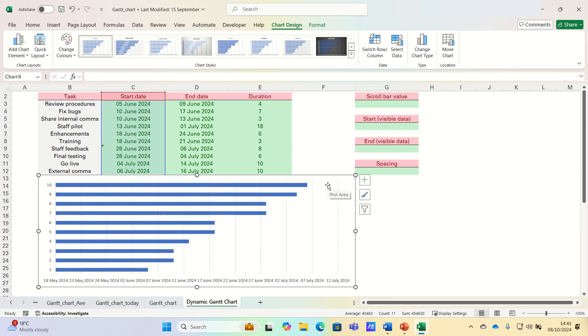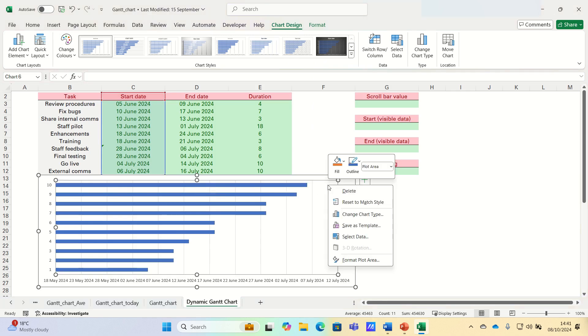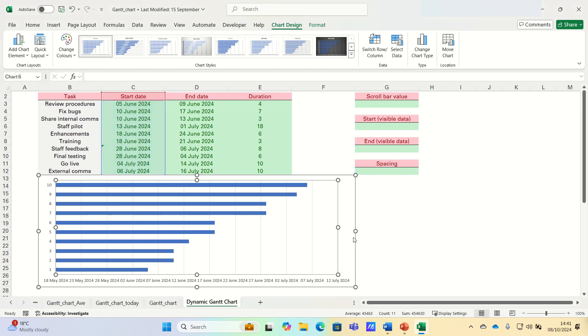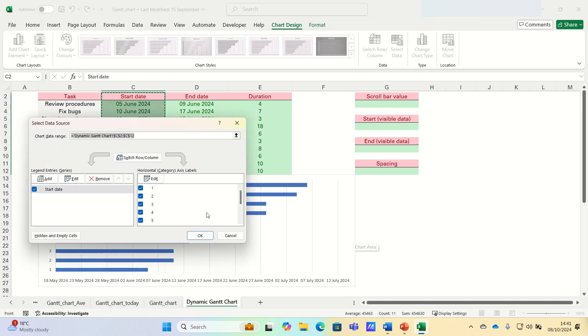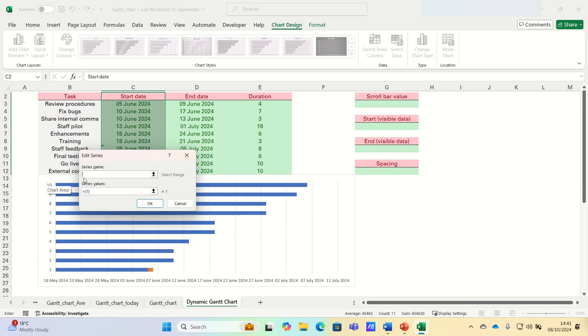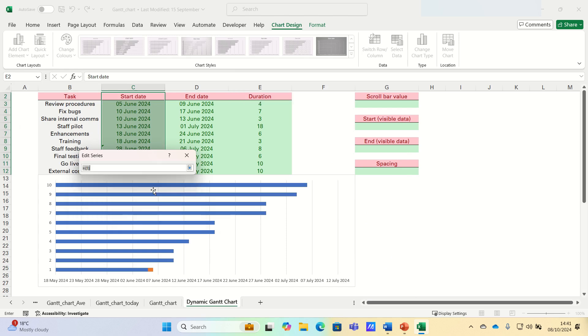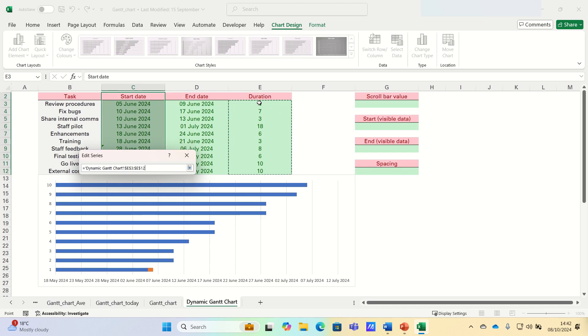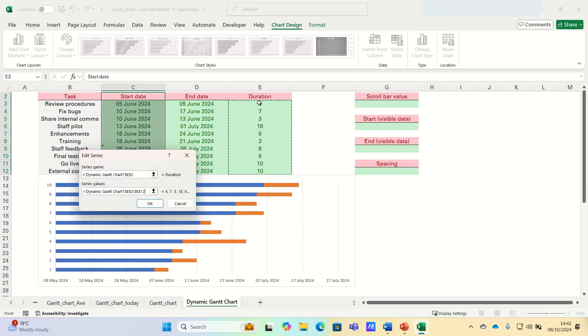To do this, right click the chart, click select data and then click the add button. The series name is duration which corresponds to cell E2 and the series values are the values in the duration column, so E3 to E12. Finally, we can click OK.